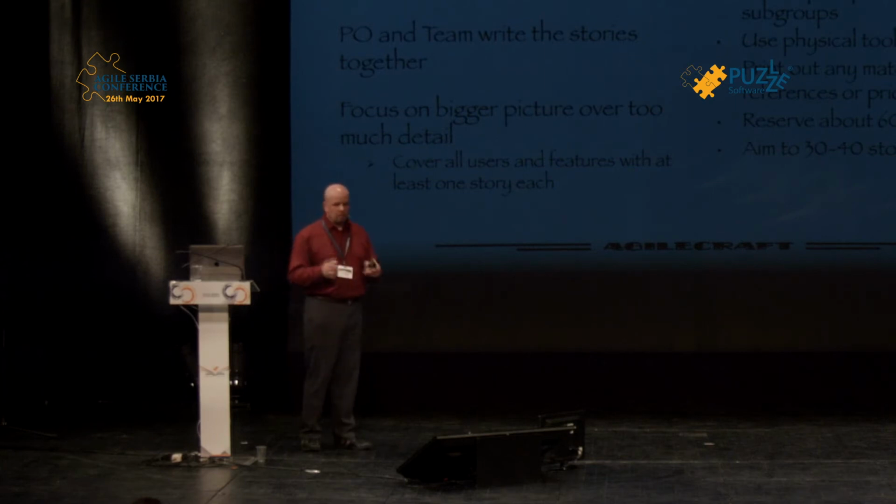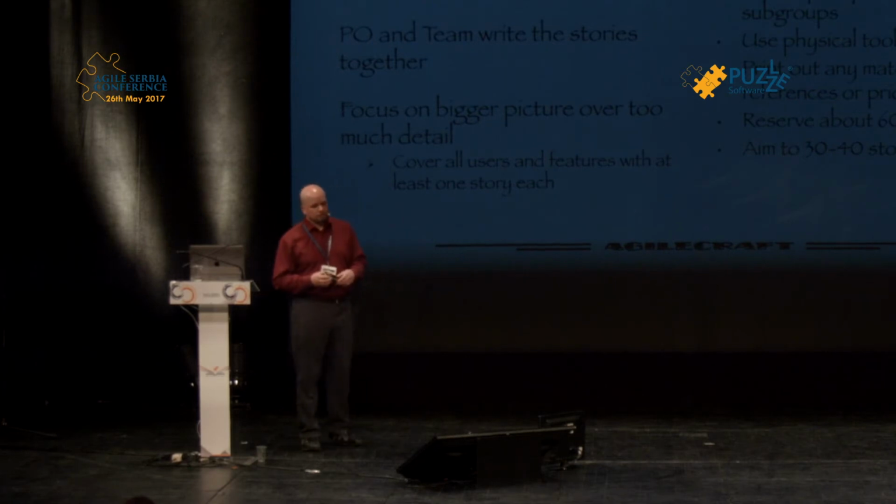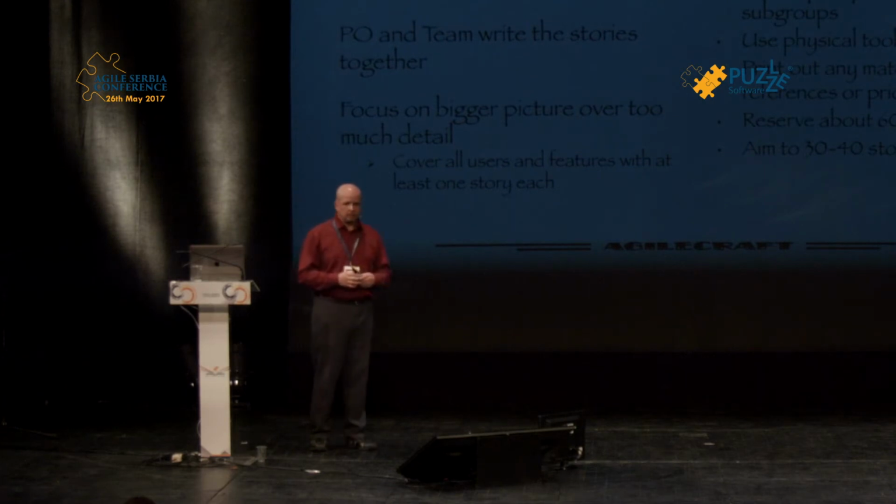Well, actually, they are reminders of conversations that we've had and that we need to have in the future. So the product owner of the team should absolutely write them together. And to write together means, for example, that you don't separate the group into subgroups. Like, okay, so the three of you, I'd like you to think about the end user. The three of you, I'd like you to think of the administrator. No, that's not collaboration. That's not the same problem.